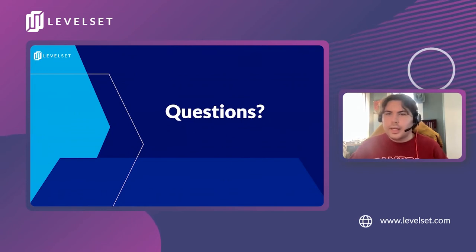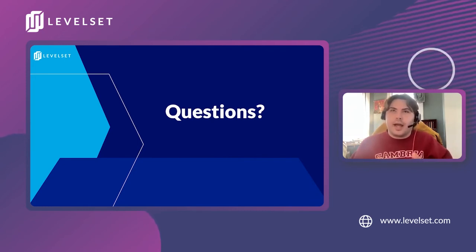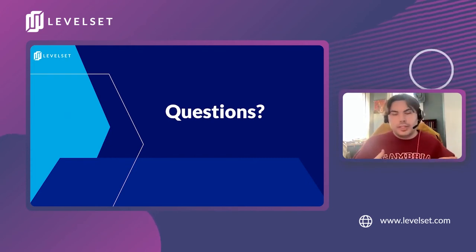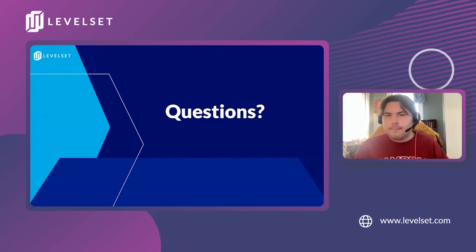Okay, and so Anita asked to explain again about whether it's okay to send late after 20 days. So when I was explaining when it's okay to send the document late, whenever you send it after the 20-day deadline, the amount that it covers changes. If you send it by the 20 days initially, then that covers the first 20 days of work if you were to go file a lien. But if you were to send it late, then that 20 days would be adjusted to 20 days before you sent the document, and then anything thereafter. Does that make sense? Okay, great.